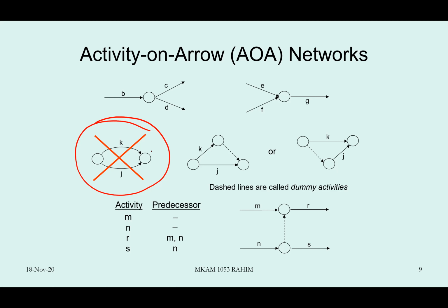Beginning and ending. If we use computer programming for this arrow diagram, the computer will be confused, because the computer does not know this activity starts with what node and ends with what node. The way the computer recognizes each activity is by the beginning node and ending node. So this is a bad way of drawing to indicate two activities. Even though we know the early start of the following activity will take whichever is the higher value, in terms of drawing, this is not a good drawing.